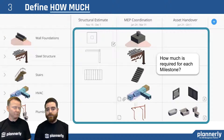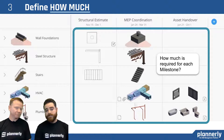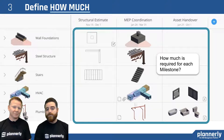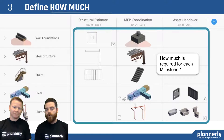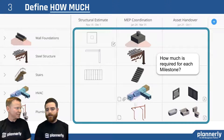That leads us to the level of geometry and the information. For structural estimation, we might just need some basic modeled lines or basic components. But once we get into MEP coordination, we might need more detailed information — some spaces and blockout zones, or hangers and braces.